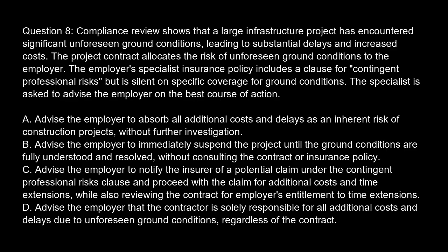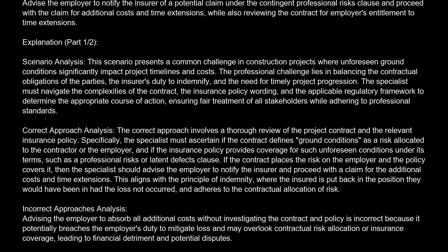Advise the employer that the contractor is solely responsible for all additional costs and delays due to unforeseen ground conditions, regardless of the contract. Correct answer is C. Advise the employer to notify the insurer of a potential claim under the Contingent Professional Risks Clause and proceed with the claim for additional costs and time extensions, while also reviewing the contract for employer's entitlement to time extensions. Explanation. Scenario analysis.